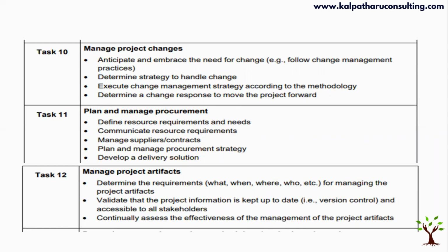We can call the plan the change management plan, and the configuration management plan also comes in handy to track the changes. So we are going to define it and we are going to manage it. When you execute, or even when you monitor and control, you may identify a change, and accordingly you follow the process and manage the changes. Even though in the predictive method we talk about coming out with a complete plan at the start of the project, still, due to various internal and external factors, changes may happen. So even in a predictive method, embracing change is important, but follow the change management process.